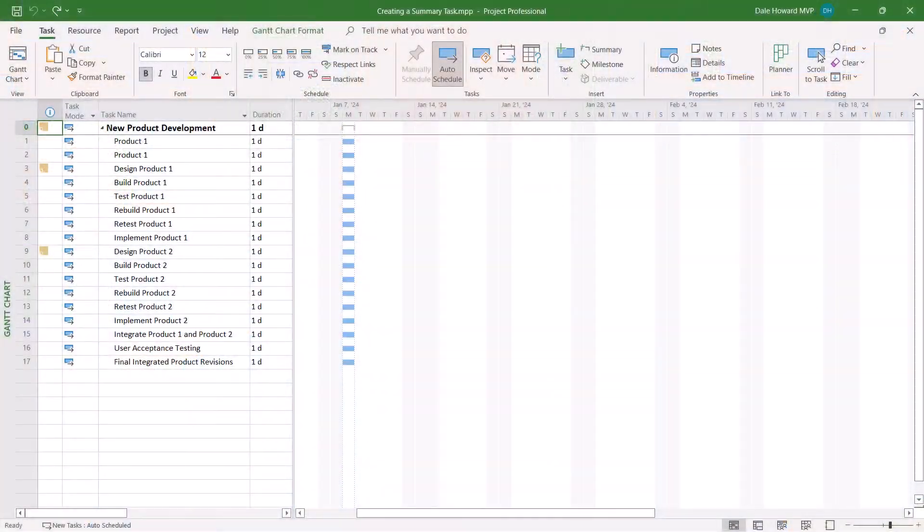So why do we need to use summary tasks in a Microsoft Project schedule? Well, number one, they define the work breakdown structure or WBS of the project. Number two, they give meaningful logical organization to the project. And number three, they can be used to denote the deliverable sections of the project.